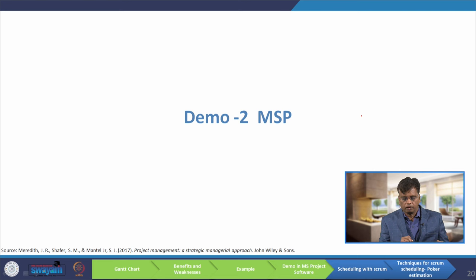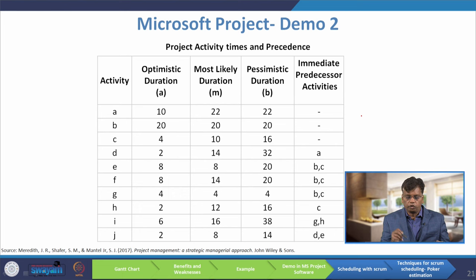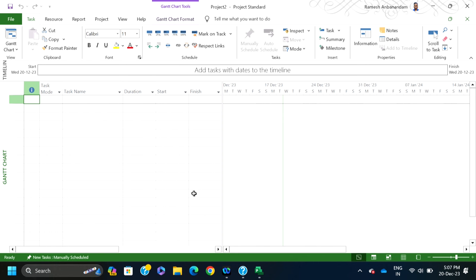Now I have taken another, slightly more complicated problem where we consider three time estimates: optimistic duration, most likely duration, and pessimistic duration. These follow a beta distribution. Using the formula for the mean of a beta distribution — (optimistic + 4 × most likely + pessimistic) / 6 — you convert to a single time estimate. After converting to a single time estimate, you then construct the Gantt chart.